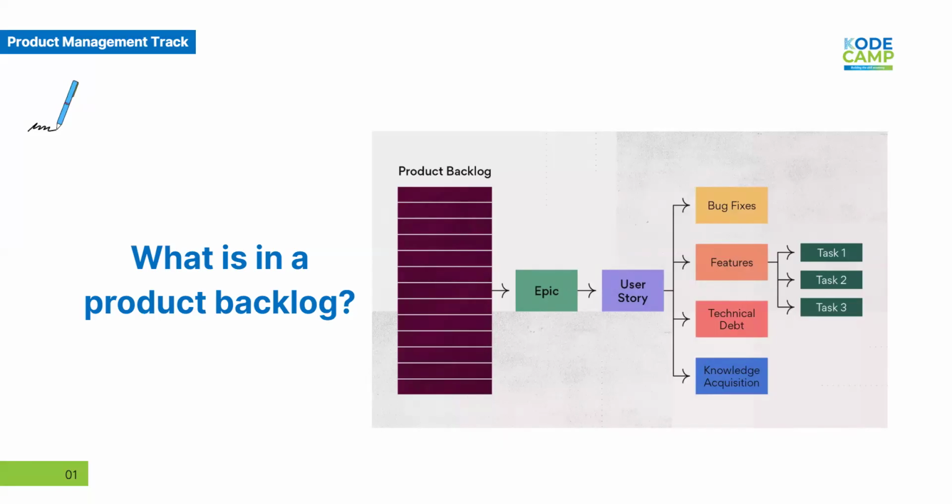Now, not all bugs are equal. Some are edge cases, right? Some are low impact. Those can wait, you can triage them. But the key thing is they must be in the backlog and tagged clearly. You need to tag them clearly. Is this a feature? Is this a bug? Is this an enhancement? Don't worry, when we get practical and start looking at tools, you'll understand all of this better. So you need to tag every item in your backlog clearly. Don't leave bugs in someone's notebook, right?